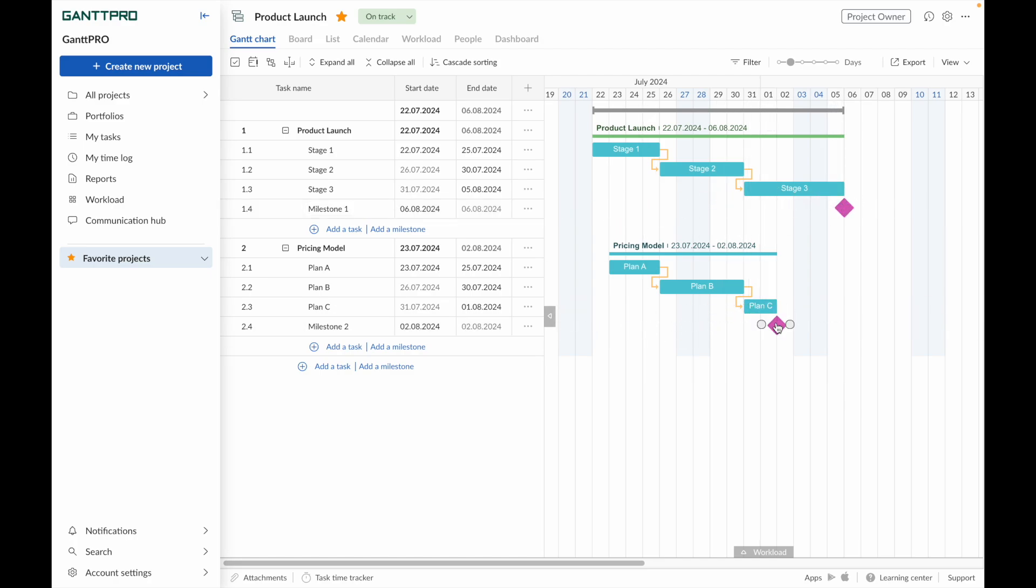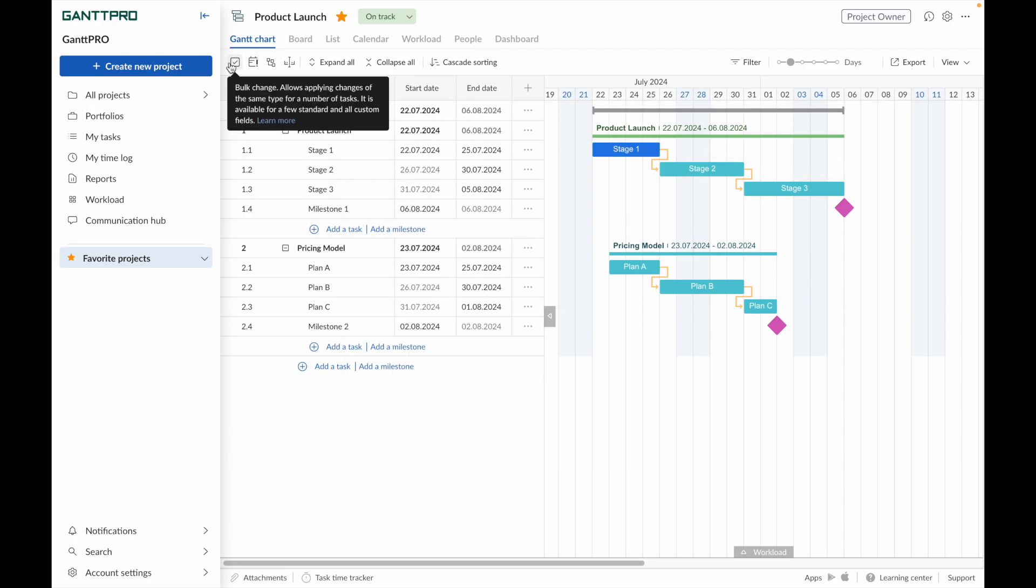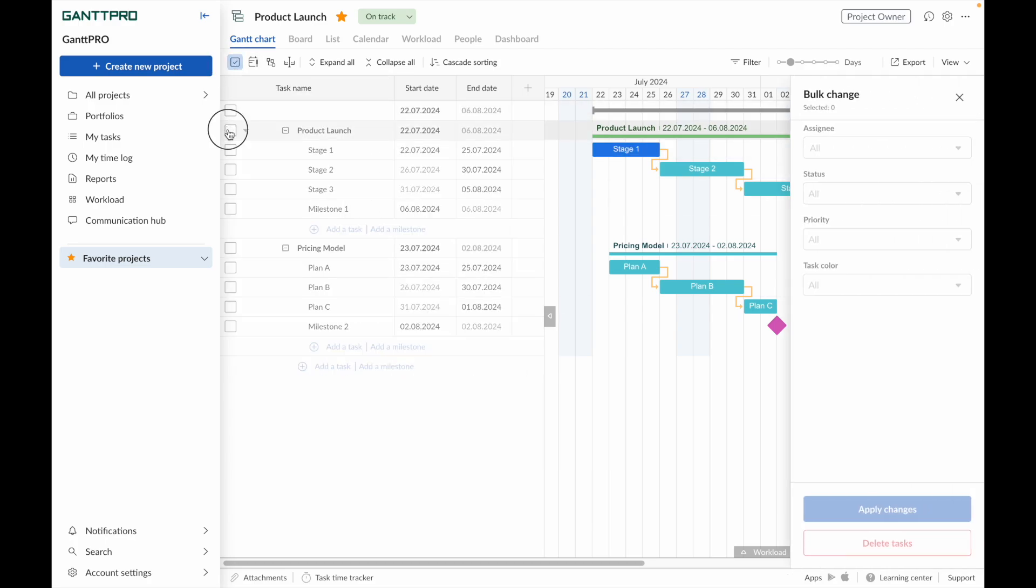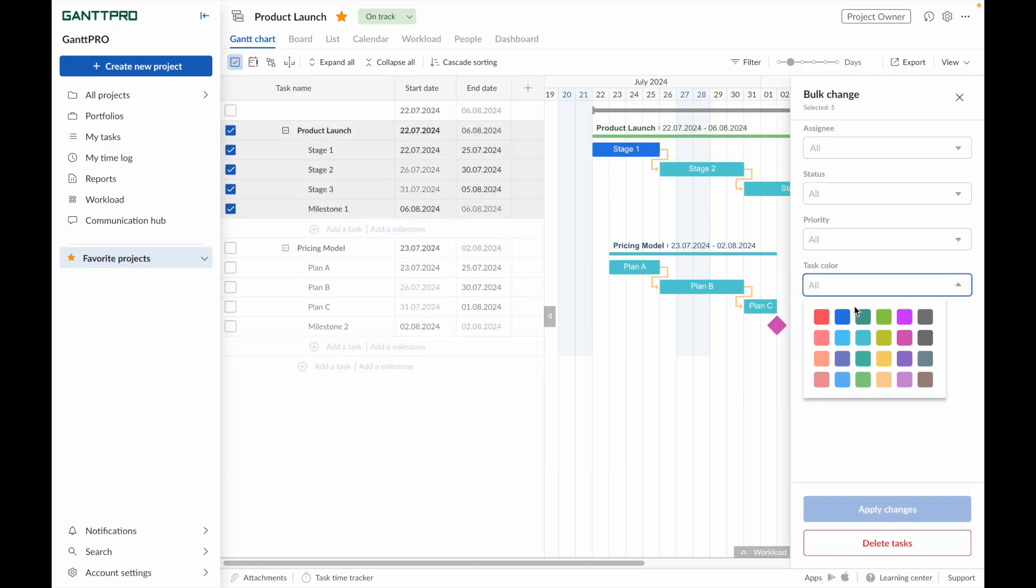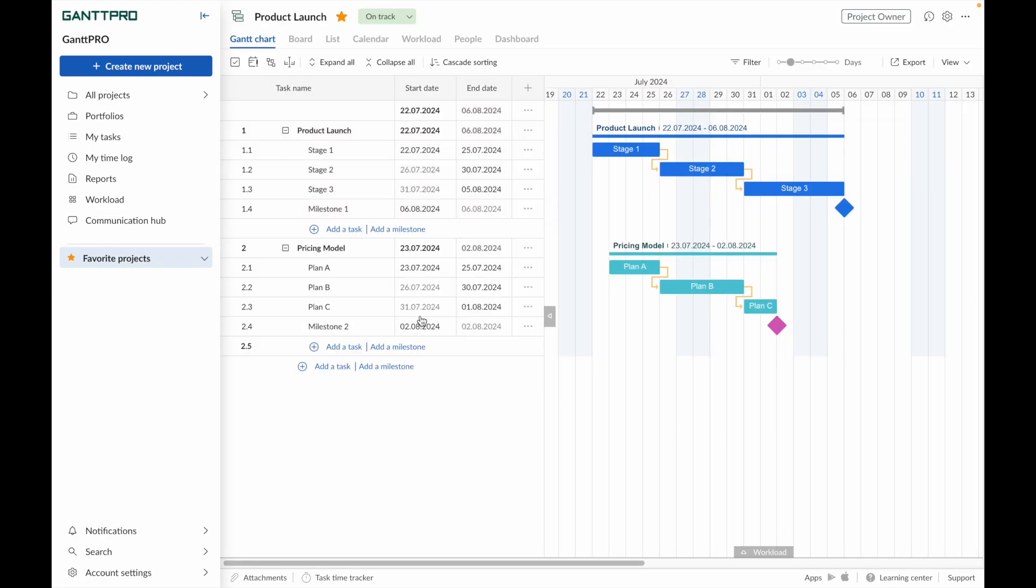Second, you can color code task groups through the context menu or through bulk changes. This can help with visualization, progress tracking, and task segmentation between departments.